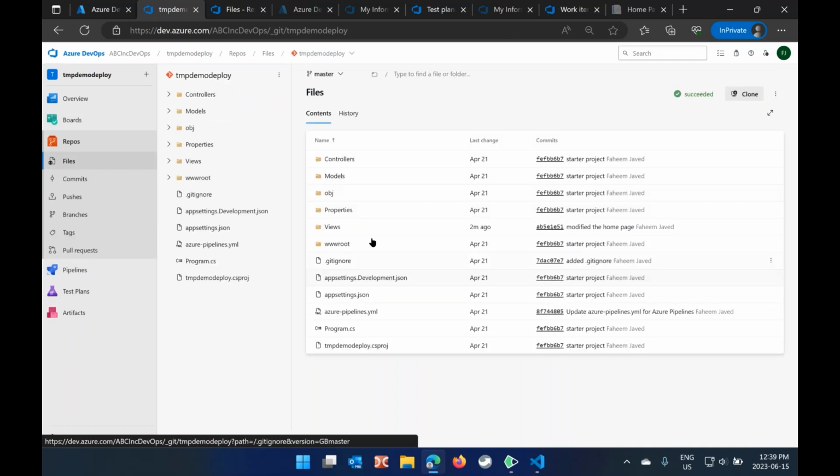And in advanced cases, it is also possible to say that every commit should be linked to some task. If you're committing some change into the Git repository, what task have you accomplished? Project management wise, you'll want to find out what did you exactly accomplish? Why are you committing the file? Which checkbox you're going to check off? You can basically even link that as well.